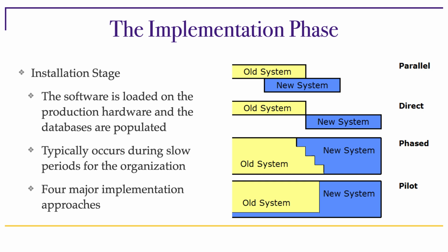In this kind of scenario, you may have 50 restaurants. And so you have the luxury of trying the implementation first in one unit, then in another unit, and you can see what the problems may be and work out solutions before you go to all the units.